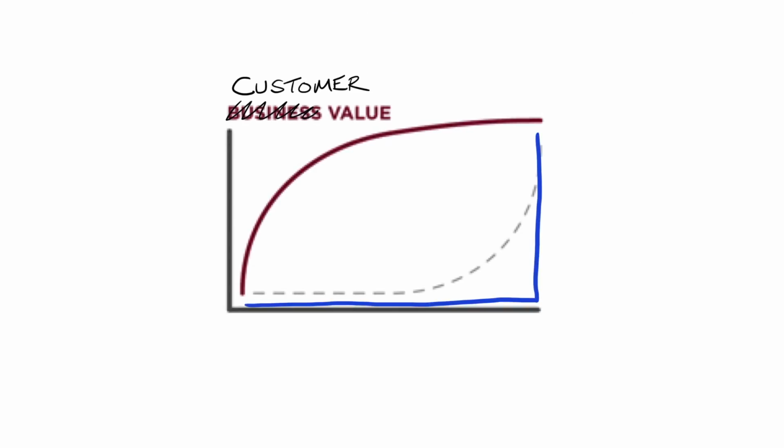Moving on to look at the Agile curve of value over time, I have to say that I'm happier, but not completely happy. I know as an Agile team we want to deliver high value items early in the project. Do we really get off to such a flying start, or is the first sprint more about getting set up? I'd like to see something that looks a little more like an S-curve to reflect the fact that we have a little bit of a slow start, but then get into our stride as quickly as possible, and then the thing levels out again as the project moves into its later stages.